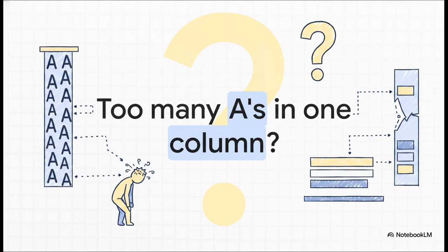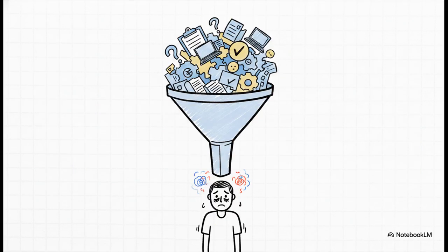Look vertically down a single person's column. Let's say you're looking at the column for the logistics manager, and practically every single task in the entire project has them listed as the A, accountable. So what are the implications of this vertical matrix imbalance for that specific manager and for the project as a whole? Well, it guarantees manager overload and creates a massive project bottleneck. If one person is accountable for literally everything, they have to approve literally everything. They simply won't have the bandwidth to make decisions fast enough, and your project momentum will stall out completely.